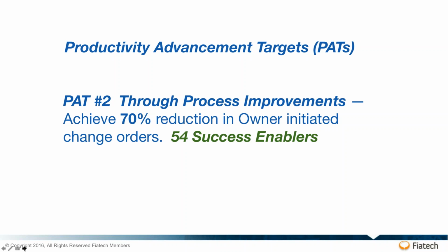So that's pretty amazing. You start saying, well, this isn't a theoretical thing. This isn't a solution provider talking point. This has actually been done. And he talked about the rigors they went through to keep the 3D model in lockstep with as-built, and continually validating the dimensional information as soon as is economically feasible early on, and looking at its impact on the overall 3D model.